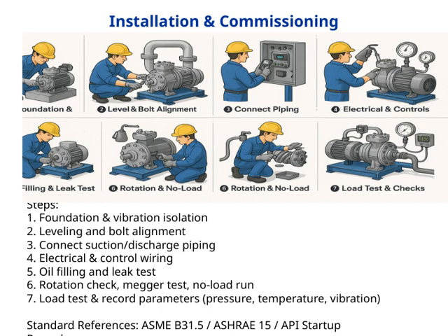Throughout this process, we adhere to standards such as ASME B3015, ASHRAE 15, and API startup procedures, which provide a solid framework for safe and effective commissioning. This step is essential to ensure the equipment is ready for long-term, trouble-free operation.